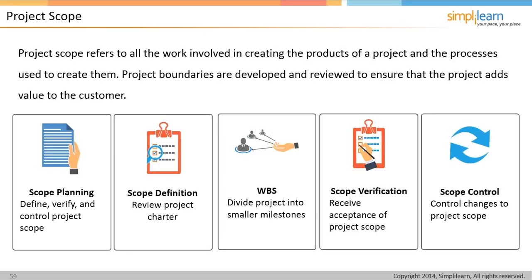And even though it's an opportunity that maybe is important to the business and could be improved with some time and effort, if you go after all of those opportunities, because they're outside of the scope, you get the scope creep. And suddenly you're going after that issue and this issue and another issue, and those issues lead to other issues. And it blows up on you. You've got far too much stuff that you're trying to keep a handle on, and your project ultimately implodes or explodes on you because of that.